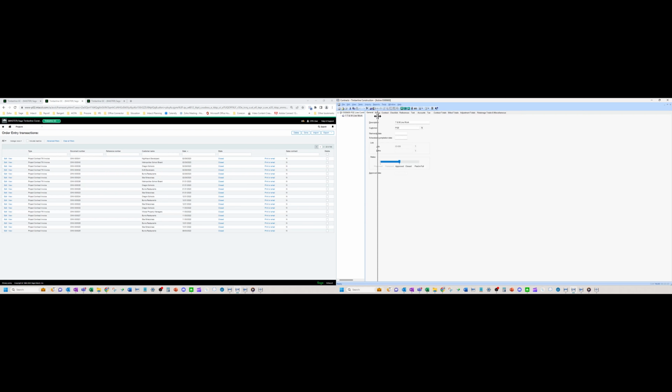It's just a total. So they're accumulating everything on one line item. So their bill might be a scope and an amount, or just a simple description on what they're billing for and $1 amount. Okay. So this one in Sage 300, you put billing type, time and materials, and you put your amounts in the actual billing module, not here.